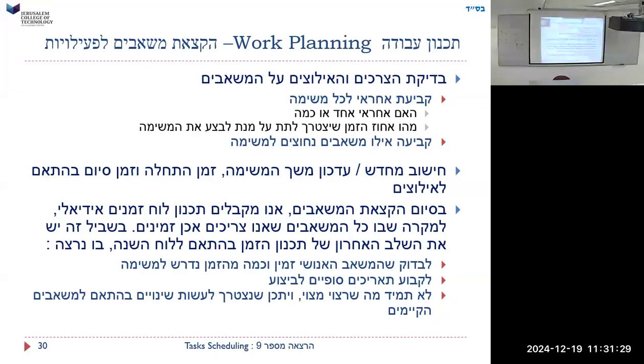If we now add in manpower, then that's going to change our graph, right? Our graph is based on effort. But if we throw a lot of people at it, then all of a sudden the time is no longer the effort. The effort is the time only when it's 1 person. Up to now, we were assuming 1 person. If we double the number of people for any of these things.